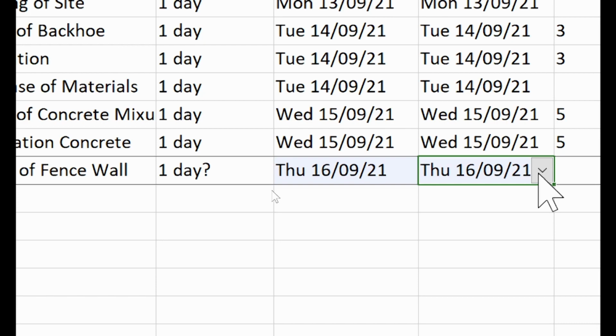A mason can lay 120 blocks, about 90 to 120 a day. The number of blocks we lay there will go on. 10 days for blocking? 5 days.